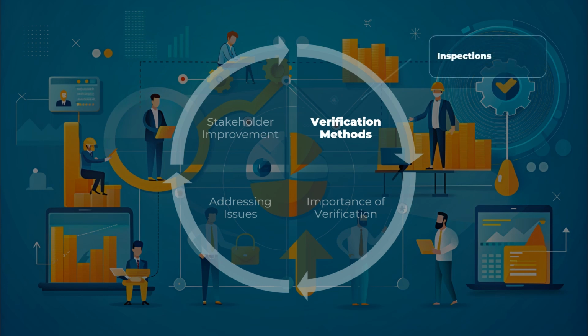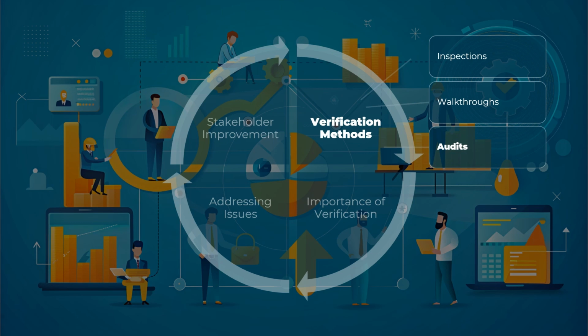Inspections, systematic examinations of project deliverables to ensure they meet specified criteria. Walkthroughs, step-by-step reviews of processes and deliverables to validate their accuracy and completeness. Audits, formal reviews conducted by independent parties to ensure compliance with standards and requirements.